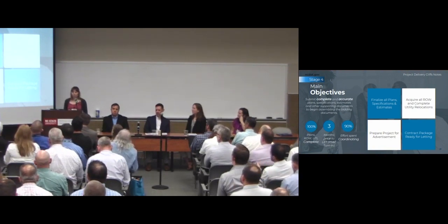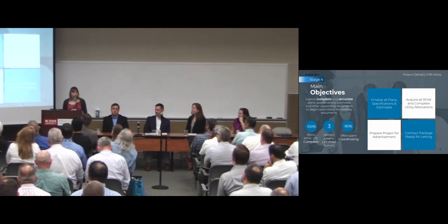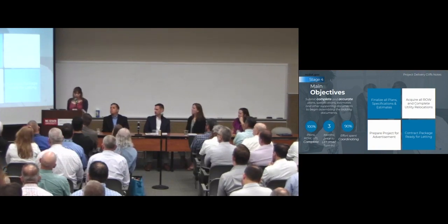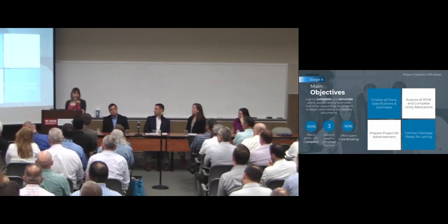It can also hurt our construction partners, and it can have a lot of submittals and claims come to the department, which construction is a lot more expensive than what we can do in design. So we need to make sure that we've got complete and accurate PS&E packages when we submit them over to contracts. So to accomplish that, the project manager leads the project team in finalizing the plans, specifications, and estimates.